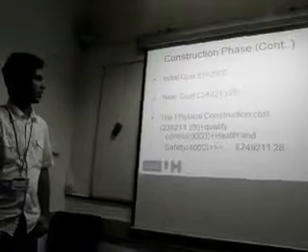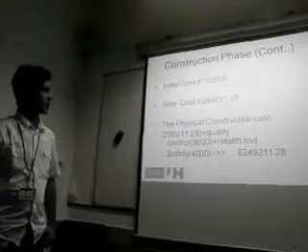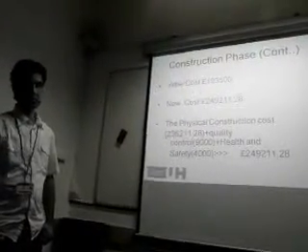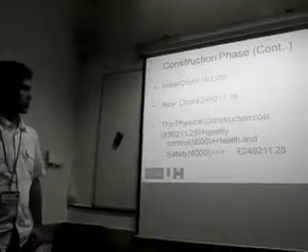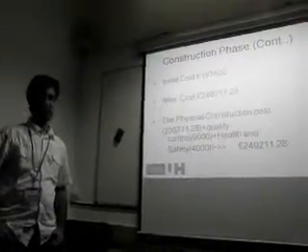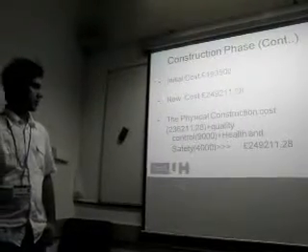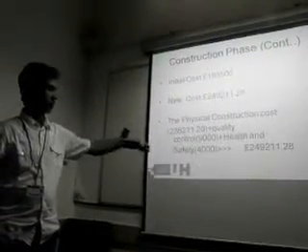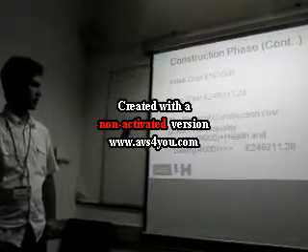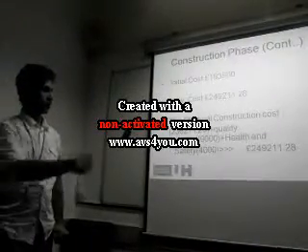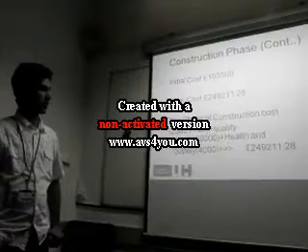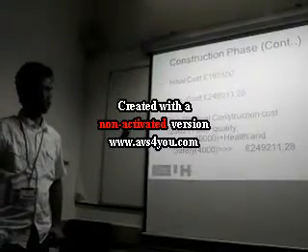In the construction, the initial cost was 1,93,500 and the new cost is 2,49,211.28. This is the change. Why did this change happen? Because we put extra resources there for the activities to finish the construction early. So the physical construction cost was this value, and then we added some quality control, that is 9,000, and health and safety, that is 4,000. So the total cost is 2,49,211.28.